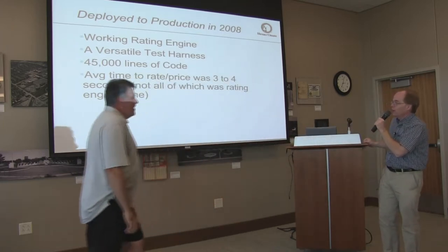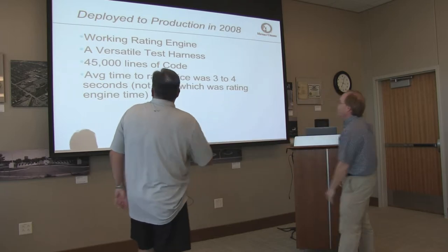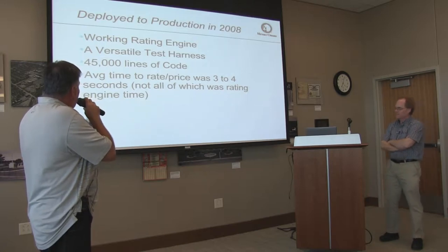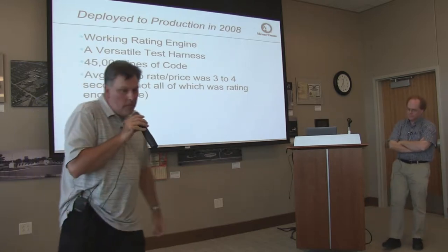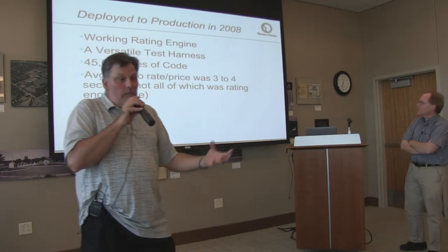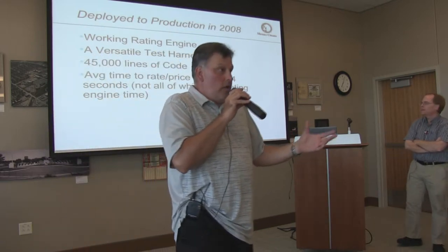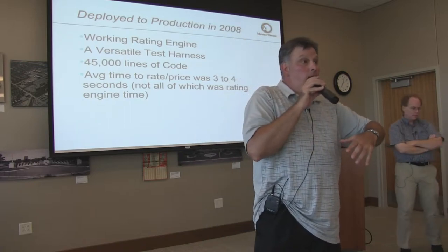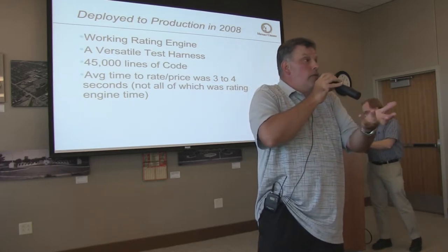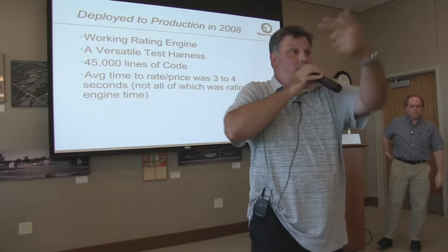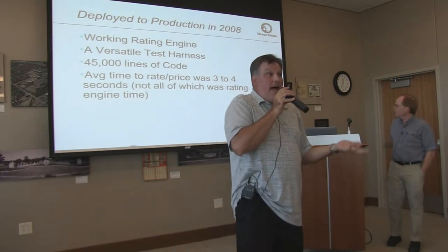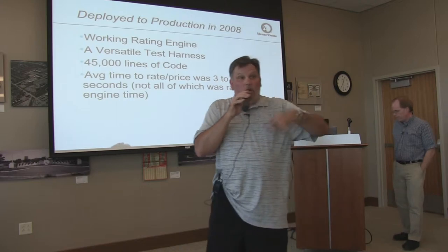So, Scott, can you talk about what we deployed in 2008? All right. What was interesting is we definitely produced a system that matched the old. Not only did we try to duplicate the behavior by looking at the existing code, but we actually took a year's worth of data for the four product lines they had, ran it through the old system, did a data conversion because it was being modeled a new way in the new system, converted it into the new system, ran it through the new system, and wrote tools that would automatically compare the old to the new. Where the rates didn't match, that's when we knew we had bugs. And we just kept working through that.